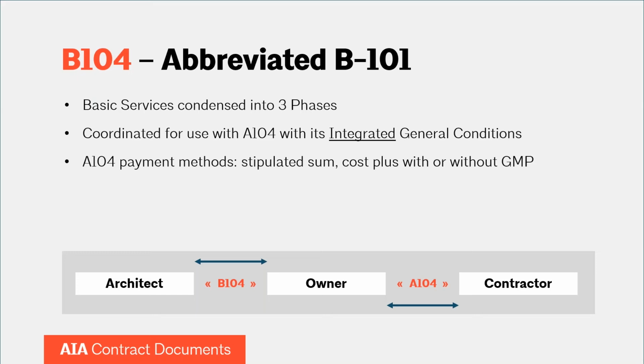We did a family room addition with a $200,000 budget. It was in an old New Orleans neighborhood, tight lots, not a lot of latitude in the footprint. So we did our little analysis. Here, scope is about services as much, if not more, than what's going to be built. We did want an approval of the design before we drew the construction drawings. But the design was not so complex that we needed the layers of design that SD and DD represent.